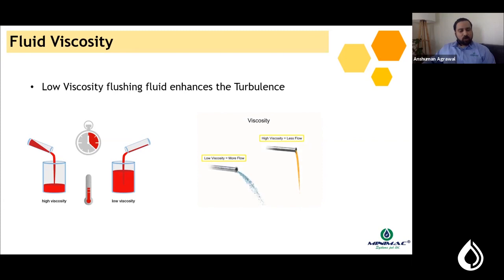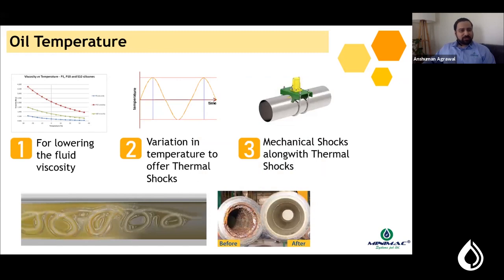The second cornerstone, fluid viscosity: lower oil viscosity provides better turbulence, as established in the Reynolds number formula. Oil temperature has three impacts on flushing efficiency: first, it temporarily reduces fluid viscosity, improving flow efficiency and Reynolds number. Second, thermal shocks are required to loosen debris sticking to the internals of pipelines.